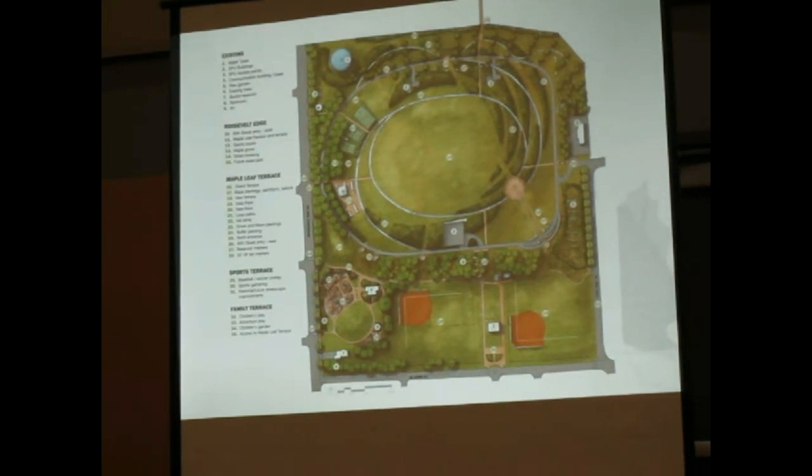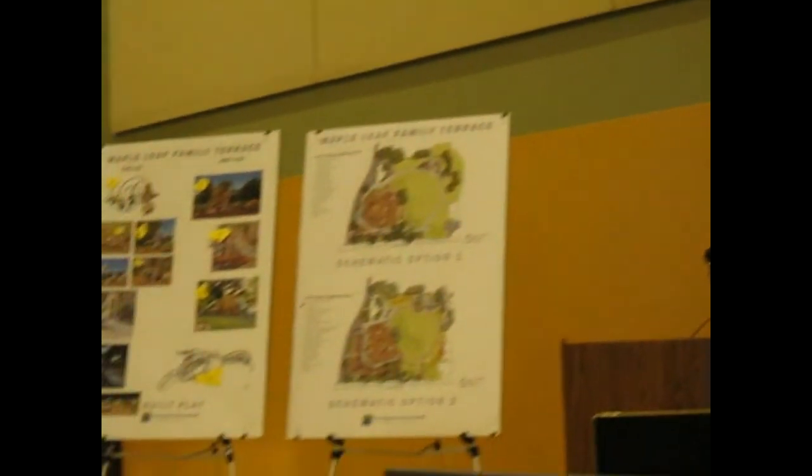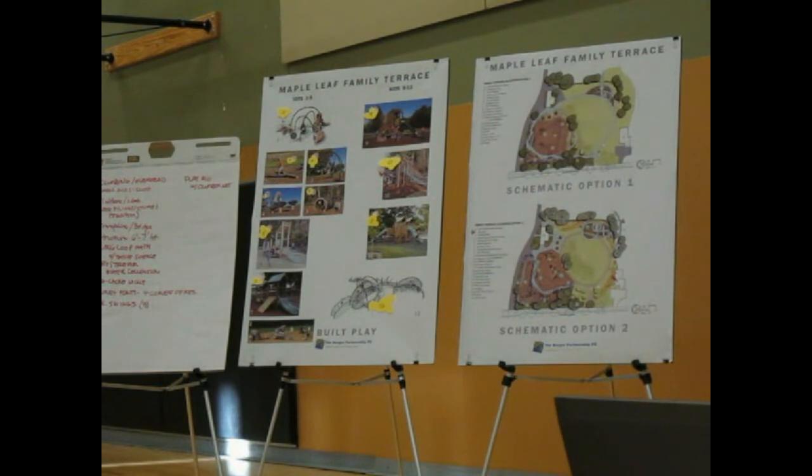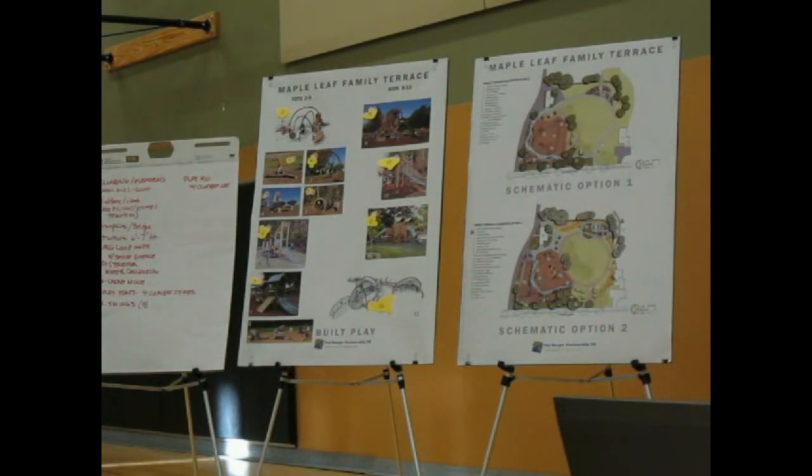So to clarify your comment, if the existing staircase was taken out, we would have to use funds to rebuild a new staircase. Yeah. And if it stays, we would save some money that potentially could go towards this other connection. Because it's a stair that's there existing. It's in great shape, and nobody's walked on it for 60 years or something. So it just needs handrails. Yeah. For the most part, I hope it's not got other flaws that we don't see. But I think both groups are probably focused on that.